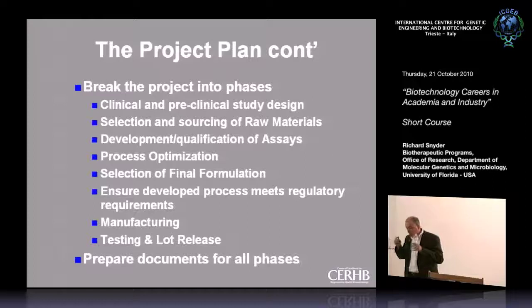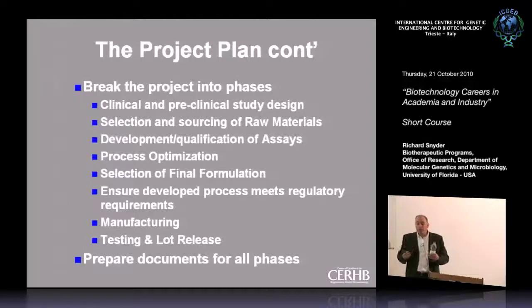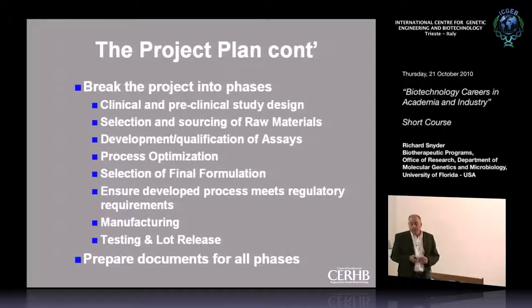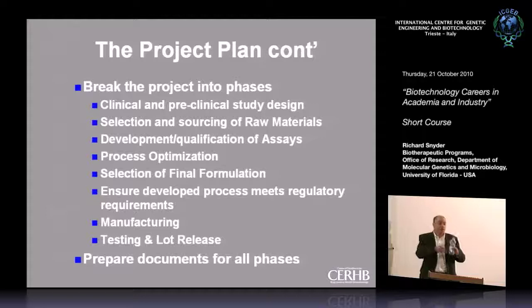To handle a project of this magnitude, you really have to break it into phases: the clinical and preclinical design, raw material sourcing, developing assays, optimizing the process, determining the formulation, actually doing the manufacturing and test and lot release, and then preparing all the documents — not just for manufacturing but for the clinical and toxicology phases as well.